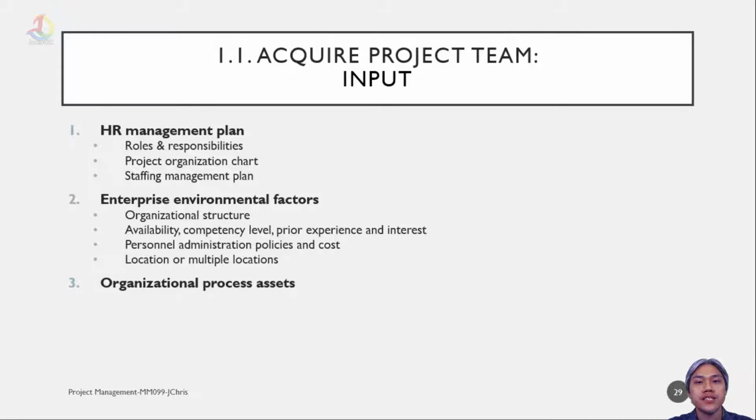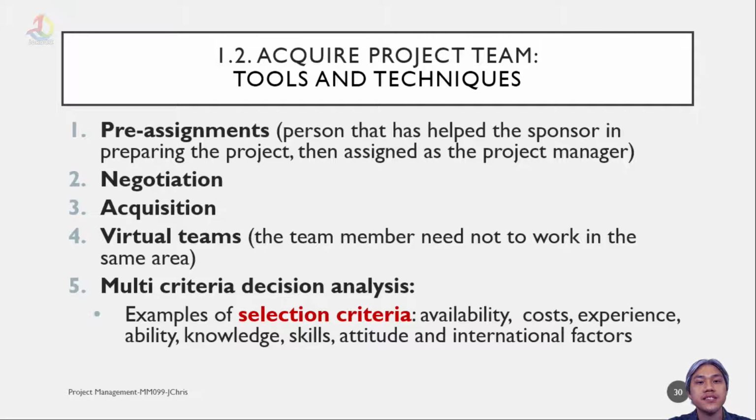In acquire project team, the inputs are the HR management plan, enterprise environmental factors, and organizational process assets. The tools and techniques needed are pre-assignment, which is the person who has helped the sponsor in preparing the project and is assigned as the project manager; negotiation; acquisition; virtual teams, if the job does not need team members to work in the same area; and multi-criteria